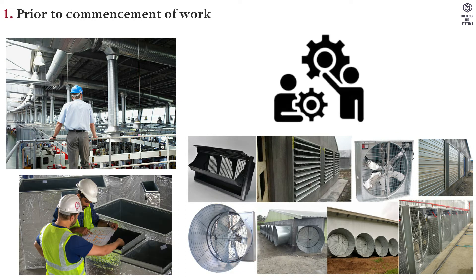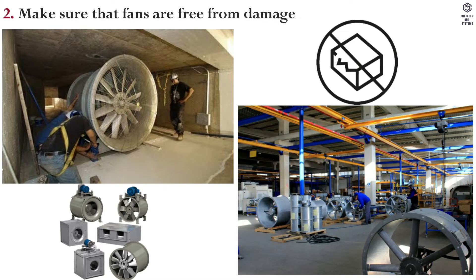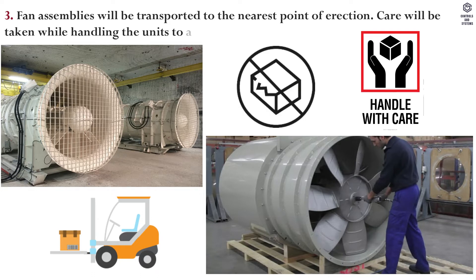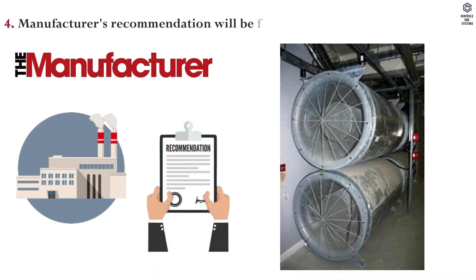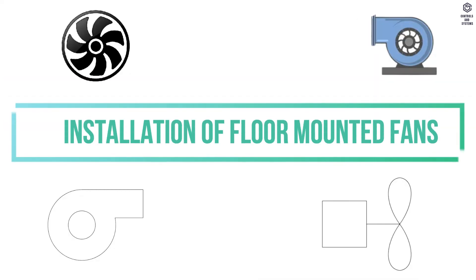Method of installation: 1. Prior to commencement of work, coordination will be done with other services. 2. Make sure that fans are free from damage and all internal components are complete and in good condition. 3. Fan assemblies will be transported to the nearest point of erection; care will be taken while handling the units to avoid damage or distortion. 4. Manufacturer's recommendations will be followed for installation of fans. 5. Fans will be installed in location as per approved shop drawing.